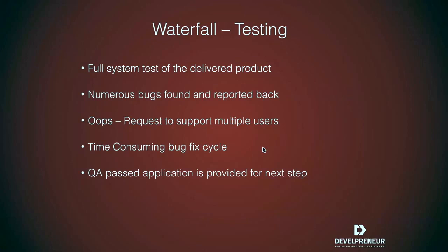Since you don't really know where to look to find the source of bugs, it's time consuming. You're going to have to walk through at a detailed level to figure out where it's actually breaking. Whereas if we had an application that we knew mostly worked, or better yet, knew worked 100% at a certain point, and then we made some changes and it broke, we'd be able to focus on where those changes were made, as opposed to looking at essentially the whole code base to figure out where the bugs occur. So it's probably going to be a pretty time-consuming bug fix cycle. But all of that being said, we hunker down and we get it done.